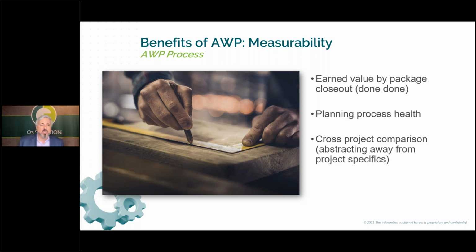Well, many of our clients have moved to doing earned value by package closeout, so done. It's not until that IWP is signed off by the owner that the contractor gets paid for that. So the earned value is not just about how many feet of pipe have I put up. That piece of pipe doesn't count until everything's done and signed off, so that you are incented as the contractor to go in and actually get it done, not to skip the little stuff and punt that to some punch list, so that the last 20% of the project takes forever because you're death by 1,000 paper cuts of all the little things that you've skipped.